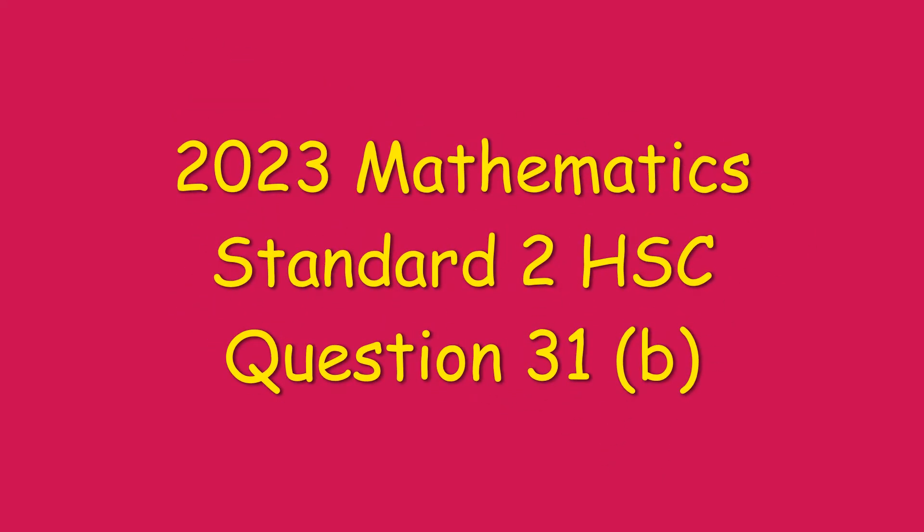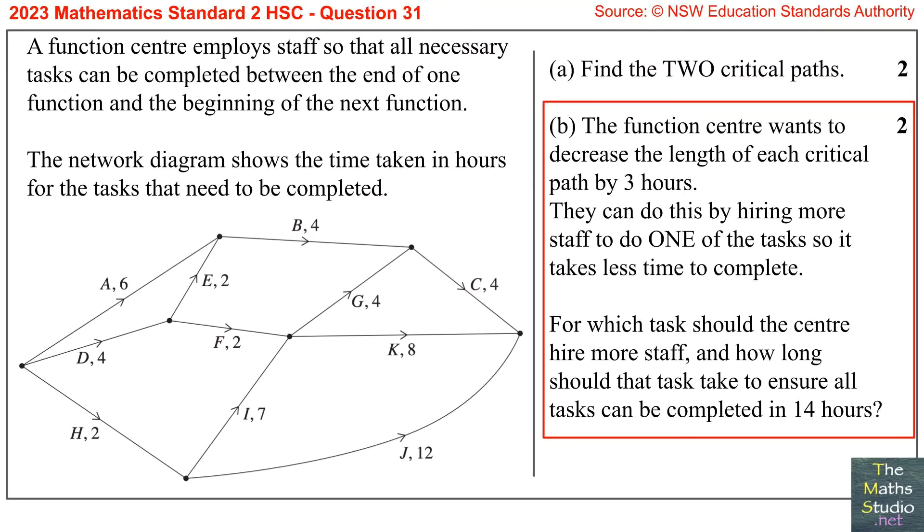Part B. The function center wants to decrease the length of each critical path by three hours. They can do this by hiring more staff to do one of the tasks so that it takes less time to complete. For which tasks should the center hire more staff? And how long should that task take to ensure all tasks can be completed in 14 hours?